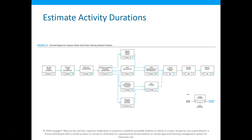I could add up the sum of all the times, and that tells me how much time it's going to take to do the project in total — how many person-hours or whatever quantity of description you want. But it doesn't tell me how long it's really going to take to do that project from start to end.